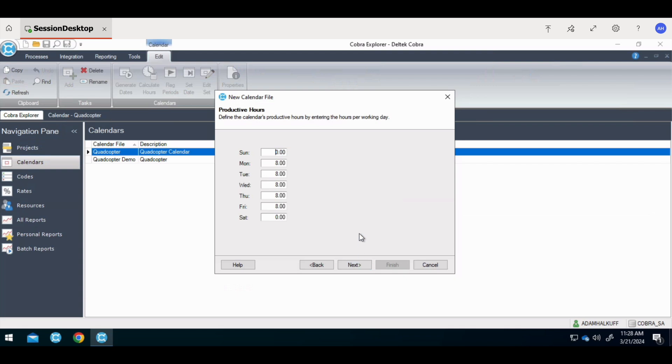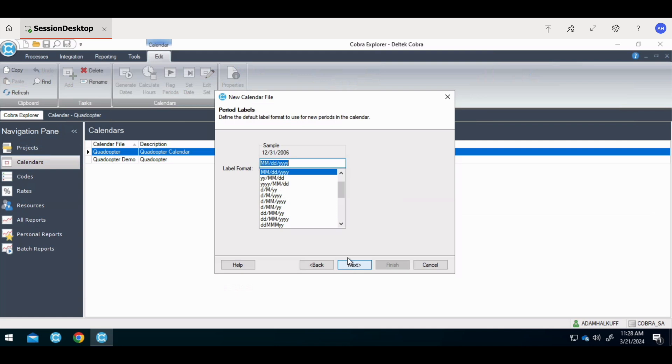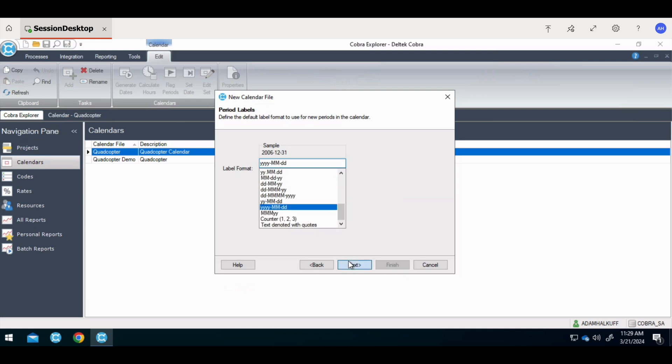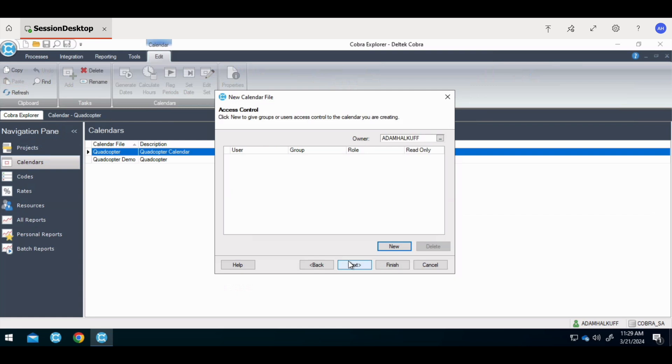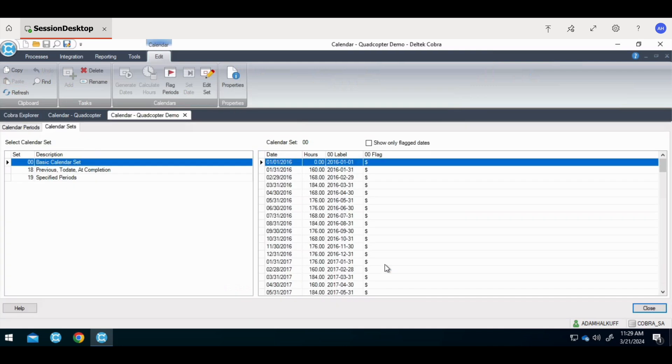In the productive hours dialog, enter the standard productive hours for each day of the week. Typically, it's going to be eight hours a day. However, if your organization defines productive time as something other than eight hours, enter that value. This will allow Cobra to calculate the hours per month based on the number of working days in that period. Next, we can choose how we want to label our periods. There's lots of different choices here. I'm going to choose this one. The access control dialog box is where you would allow other users to access the calendar. You can add users, groups, or roles here. When you click on finish, your new calendar is created. Based off of the data that we provided, you can see the end of the month for each month is the end of the period. Our labels are how we chose the labels that we wanted.